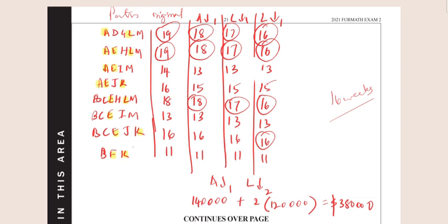Now you should do that systematically, or the chances of you missing a path is possible. So you know the critical path is the largest value, so that is 19 here. And what we should try and do is reduce the critical path such that the duration reduces to 16 weeks.